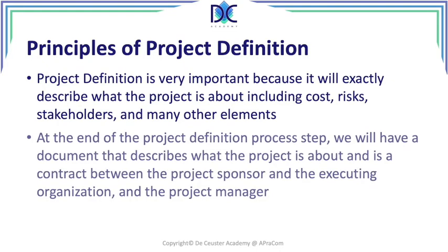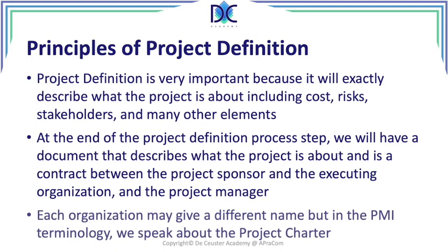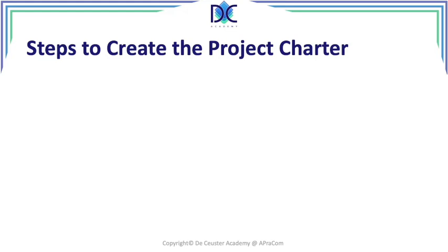At the end of the project definition process, we will have a document that describes what the project is about, and it is a contract between the project sponsor and the executing organization and the project manager. Each organization may give a different name to this document, but the PMI terminology is that we talk about the project charter.